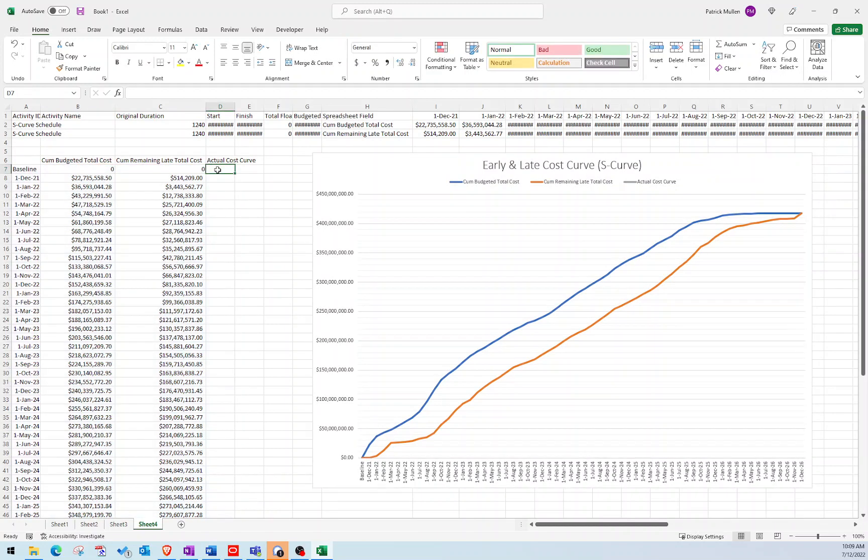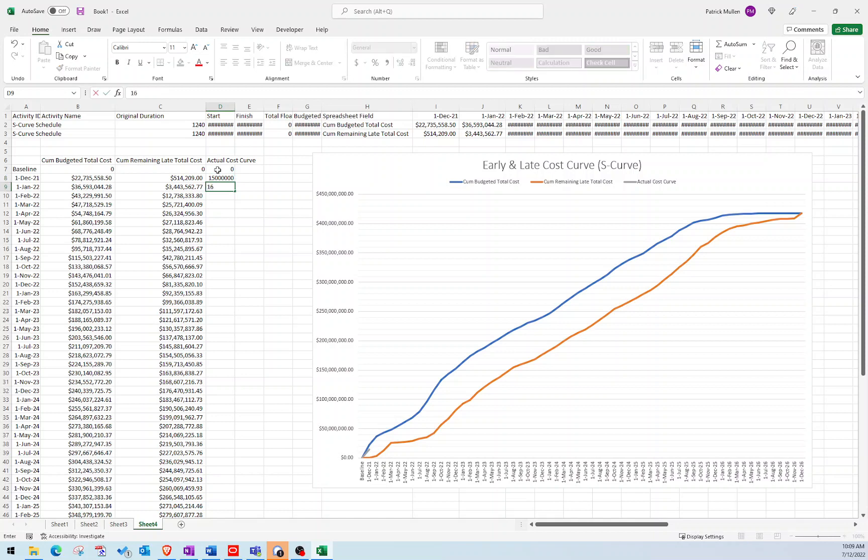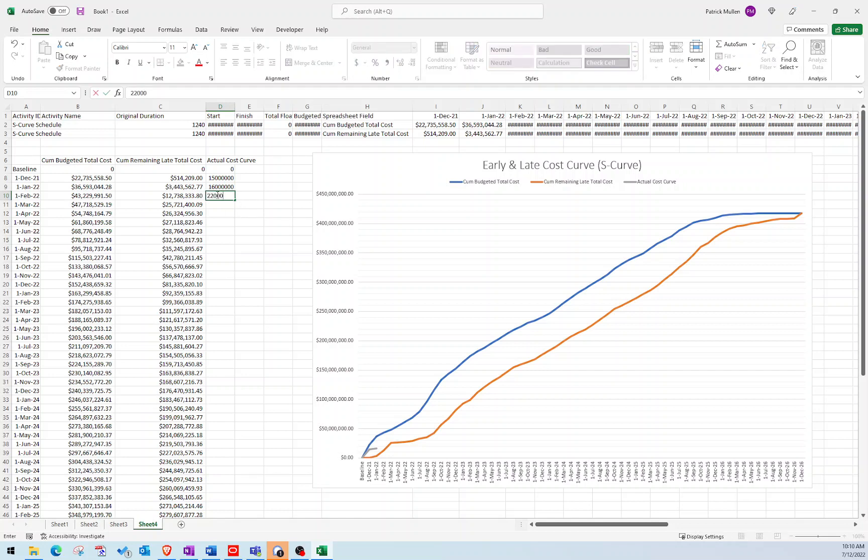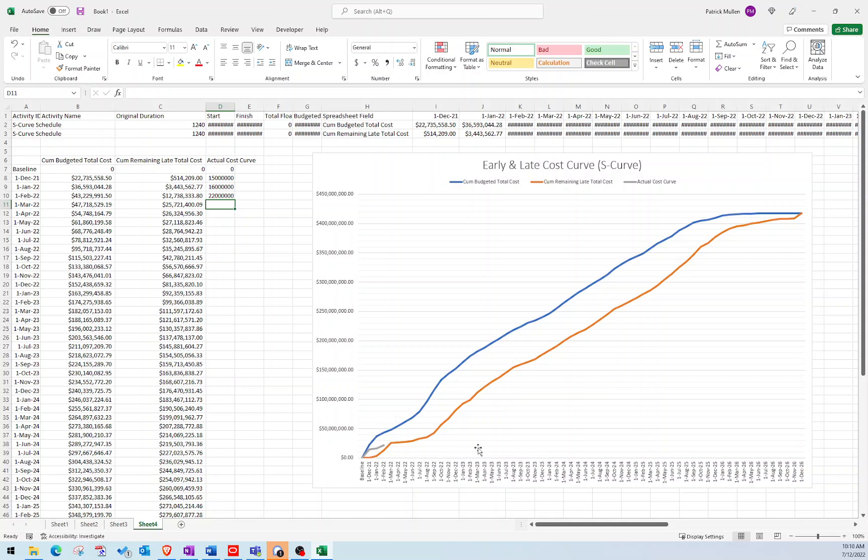So you can see here, say my first value is zero, maybe month one, maybe I bill $15 million. Month two, maybe I bill $16 million. And you can see down here as I'm doing it, it's starting to plot the actual cost curve. So maybe my next month is $22 million. And so you can see that's plotting along. So hopefully, as you're progressing in your schedule, you're staying above the late curve. And if it's below, it's indicative of a late completion.